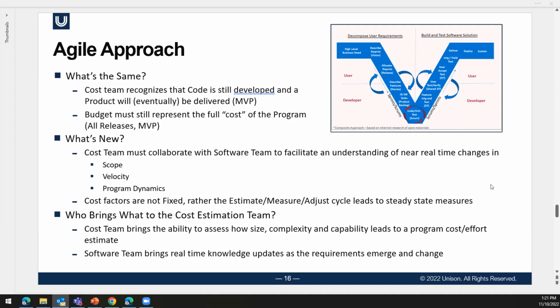Following that, once again, a good agile team has what they call a retrospective. Retrospective is where they sit down and talk about what did we do right, what did we do wrong, how do we see things changing just within the team. And ideally, there would be a member of the cost team that would spend time in this walkthrough listening to the customer, that would spend time in the retrospective listening to the team talk about how this is going to change things, our velocity is going to change. Ideally having a cost team member as a regular attendee to Agile related meetings, not a full-time participant in the Agile team, obviously, maybe not going to the stand-up every day, but at least attending a walkthrough or a retrospective or both.